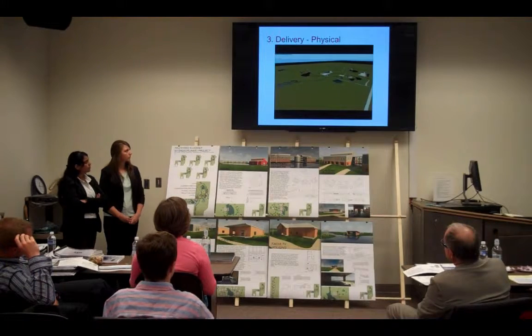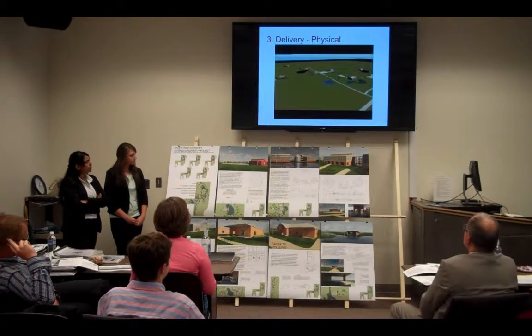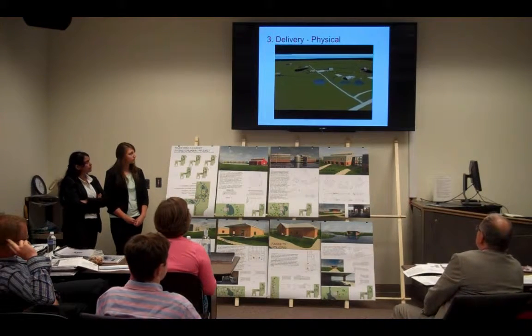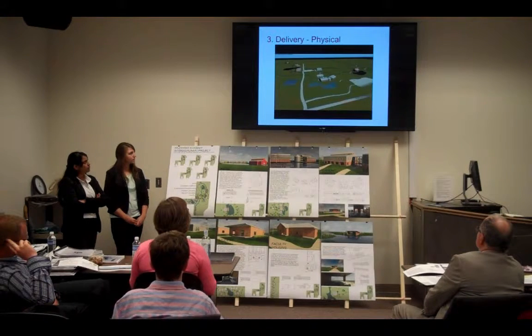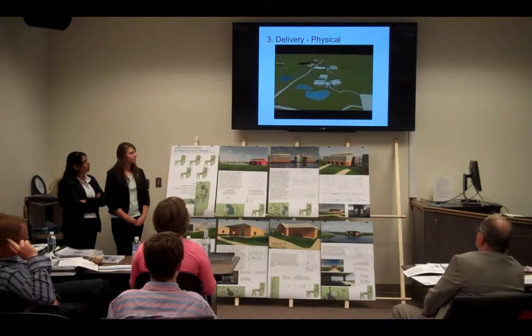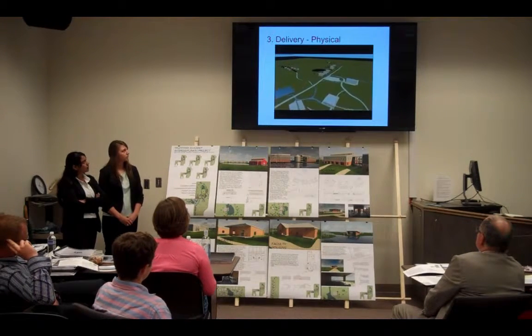The project consists of 5 phases over a span of 10 years. The first phase consists of barn, academic building, chapel, student and staff housing. The second phase consists of the second block of academic building, library, staff and student housing. The third phase consists of extension of academic building, student and staff housing.